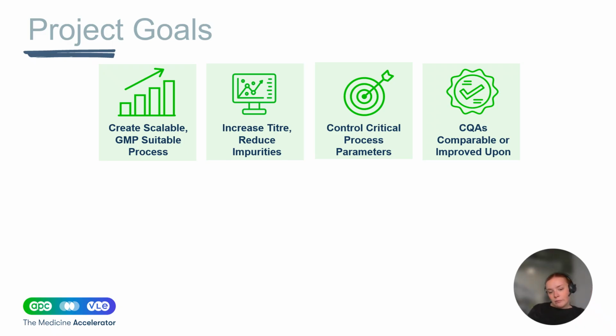Rapid tech transfer to GMP was really important. So our scalable single-use equipment, the equipment that's in our MSAT space, is the same equipment that's in our VLE suite, so that we can scale directly from our 50 or 250 litre MSAT space directly into our VLE suite, so that our gap assessment on that tech transfer doesn't have many gaps because the equipment is the exact same. All the single-use manifolds are the same. So everything is very lean and agile in that case.